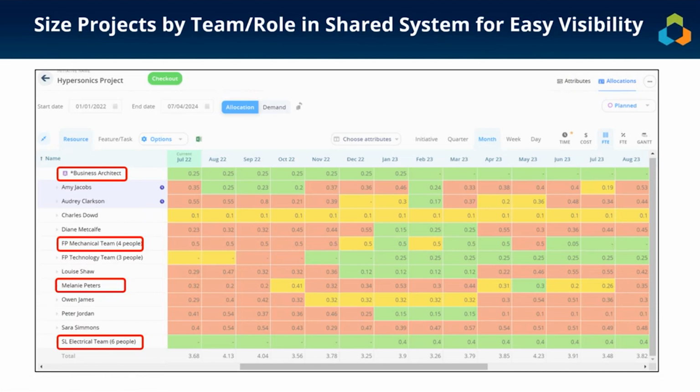It means that on the back end, whoever their release train engineer or functional manager is has overallocated them, and that's introducing risk to your particular project. You can look at these estimates by hour, by story point, by percentage of team, FTE, or you can look at it by cost because cost comes along for the ride.